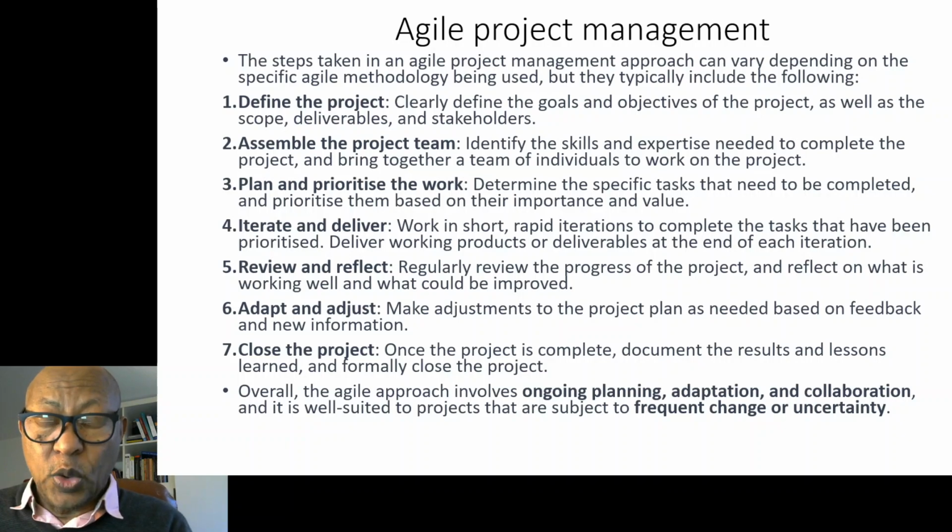You involve stakeholders, system users, and then you start planning in terms of prioritizing. What should we produce first that the user can actually test and have a look at what the system does? So you produce a bare system whereby things can be tested. This is a methodology which advocates iteration of producing the product. You produce something, you allow users to taste it, and then if they are happy, you start to build on it.